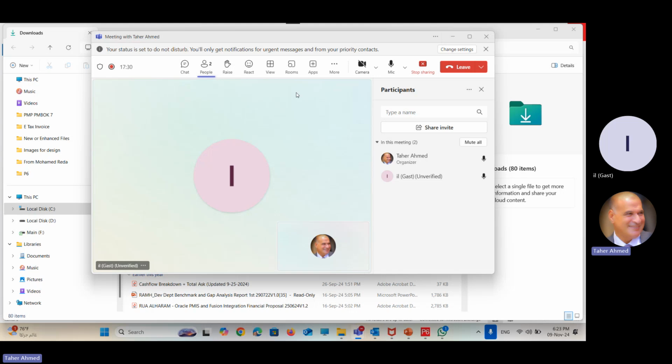Maybe sometimes we deal here or in Saudi Arabia with a fast tracking project. What is the meaning of fast tracking project? No holidays, 7 days per week, 12 hours per day, and maybe 2 shifts a day. So in this case, this calendar is not applicable to be used for our other projects. We have to create it for this project only.